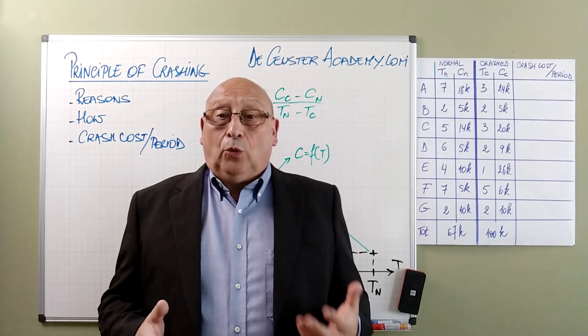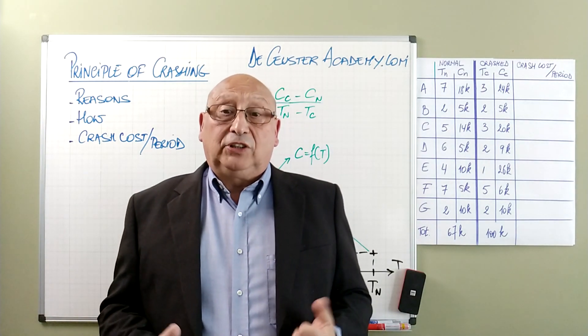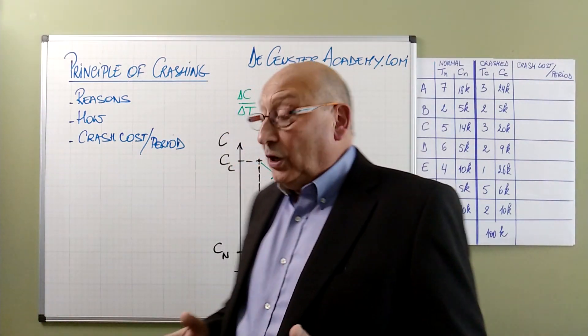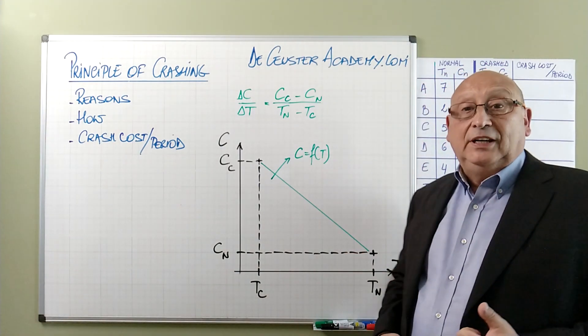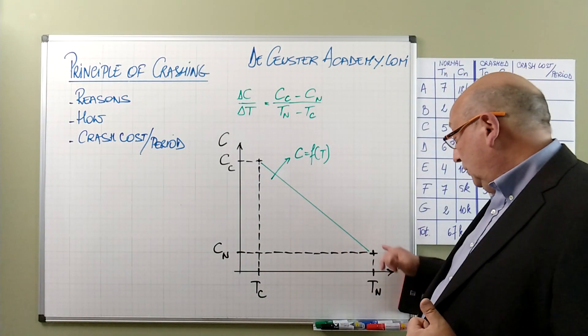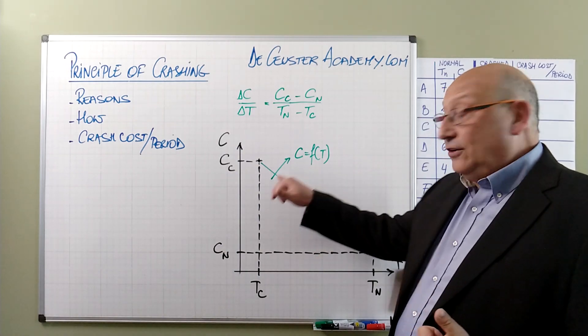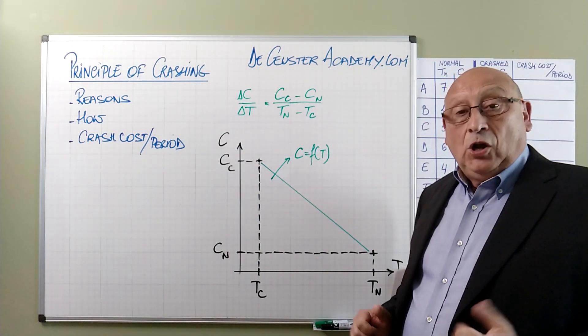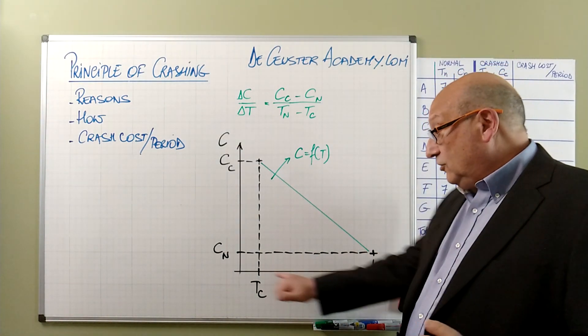We want to find out what is the crash cost per time unit. When we're looking at the crash cost, we make the assumption that the link between duration and cost is linear.